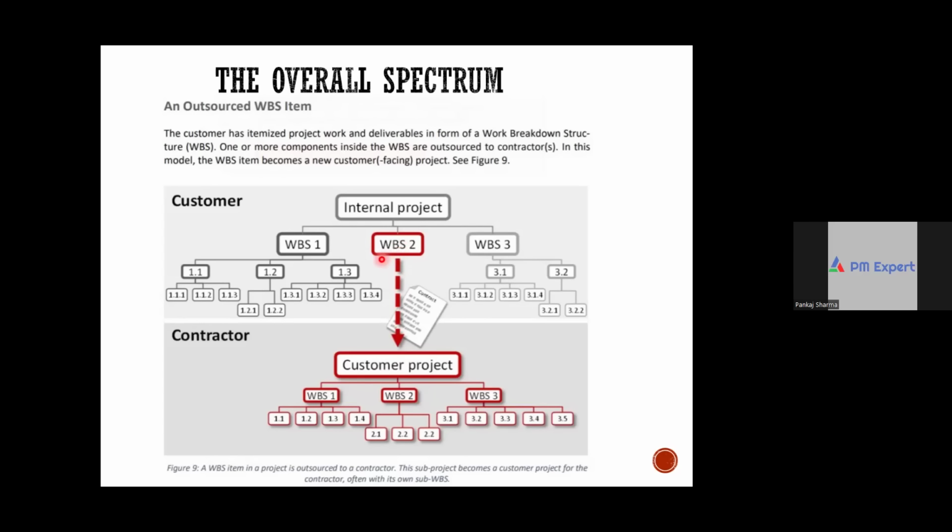Also, in the RFP shared by the customer, there was a statement of work. Based on that statement of work, you submitted the proposal. So can that statement of work suffice the purpose of the charter or not? Yes, it can. So how should this guy start the project? This guy should plan further.